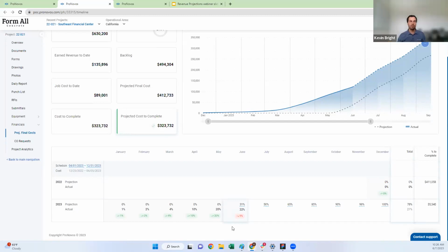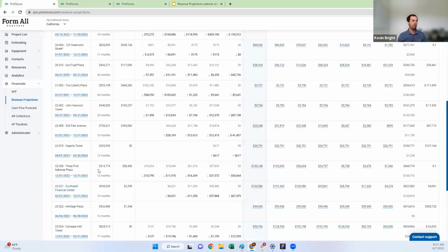Yep. Yes, exactly. So if it says, hey, in July, I'm 50% done, well, that's going to be 50% of my contract is going to be my revenue completed in July. Then in August, it's going to say, okay, if I'm 65% complete, that's going to be my total revenue at the end of August. So now if I know what I did in July, and if I know what I did in August, I can say, okay, the delta between that is the revenue that I actually did in August. So once you've updated either the cost or the percent complete here, it's going to flow right back in here, and you're going to see those updates accordingly at the project or at the company level.